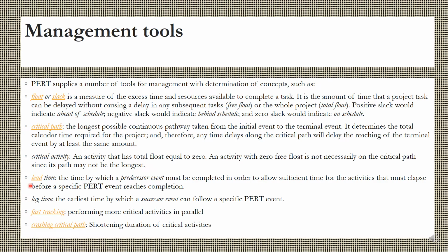Lead time: the time by which a predecessor event must be completed in order to allow sufficient time for the activities that must elapse before a specific PERT event reaches its completion. Then lag time: the earliest time by which a successor event can follow a specific PERT event. Then fast tracking: performing more critical activities in parallel is fast tracking. Shortening the duration of critical activities is crashing the critical path.